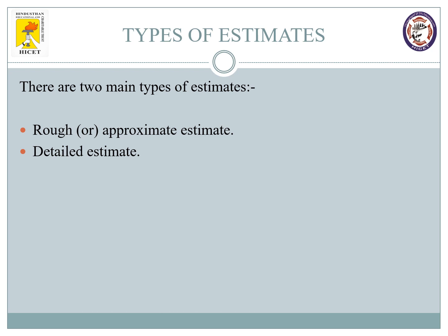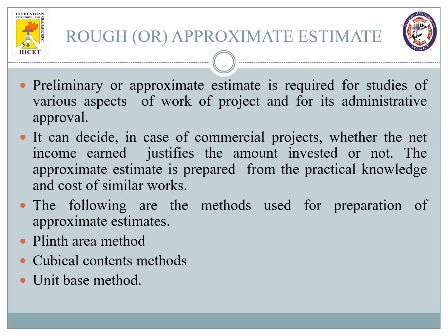That is, I can have a deviation of 5 to 10%, but that is the maximum deviation. I can give an exact probable amount or cost of my project to the client, and that can be calculated only through detailed estimate. We will see about these two types in a very detailed manner in the upcoming slides.